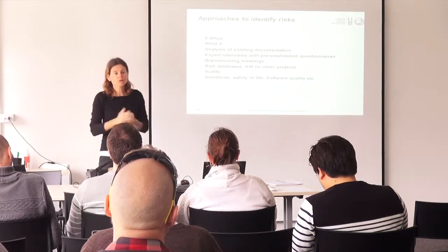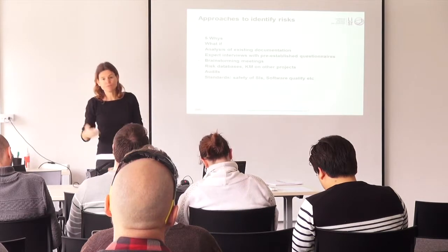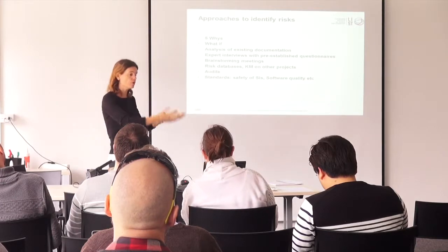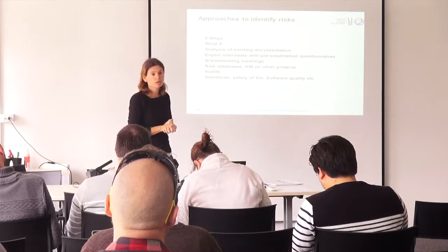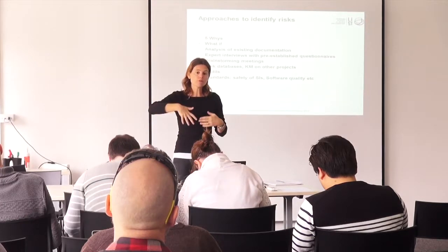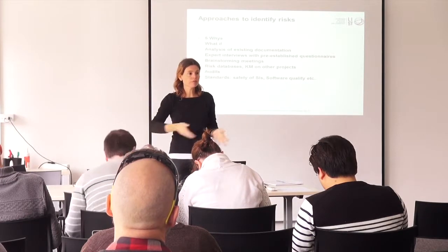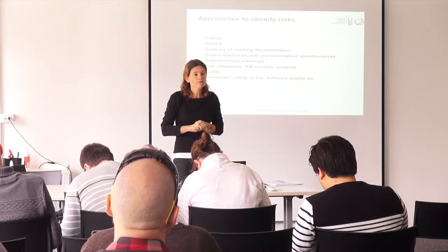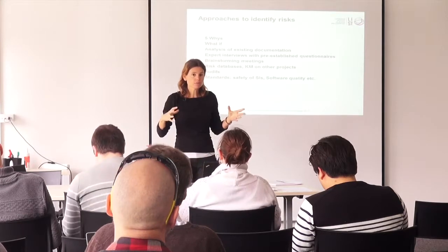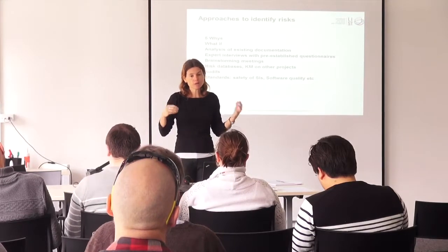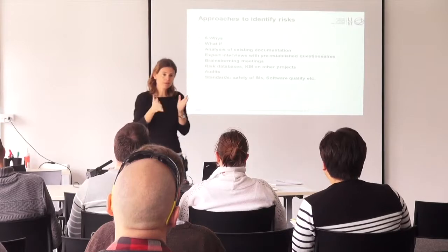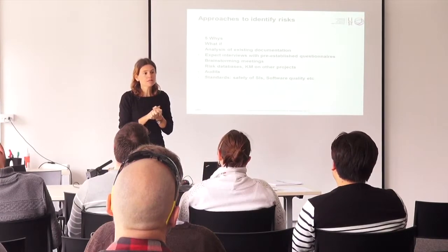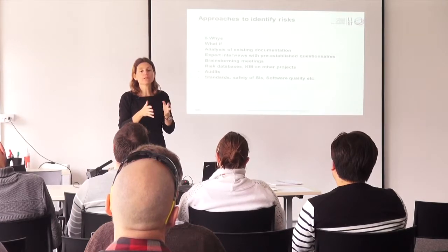The what if technique. What if we don't have that material in time? What if this does not go right? What if so? Just taking all the items that you have in your planning, all the resources, all the elements that you have defined in a project, looking at them with a risk eye and saying, what if this is not working as planned?